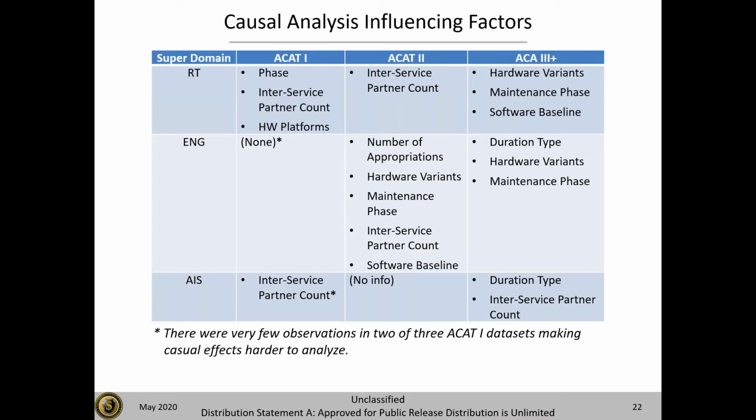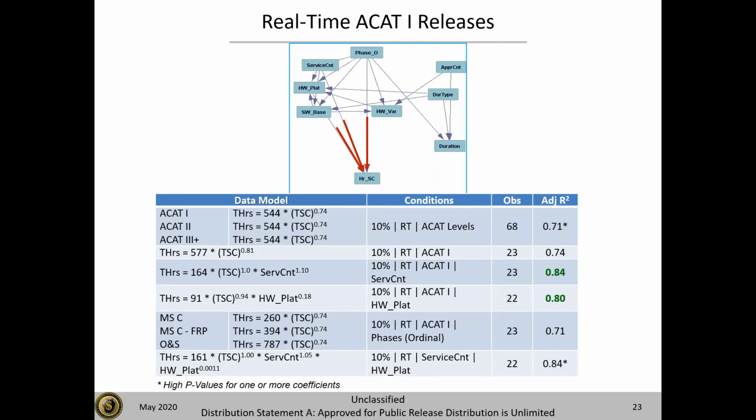cost was. And that kind of makes sense, because if you've got more partners, then you have more people affecting requirements and changing requirements, and you also have more people that you have to communicate and deal with, which obviously increases cost. So if we take that first block and we look at that in a little more detail,